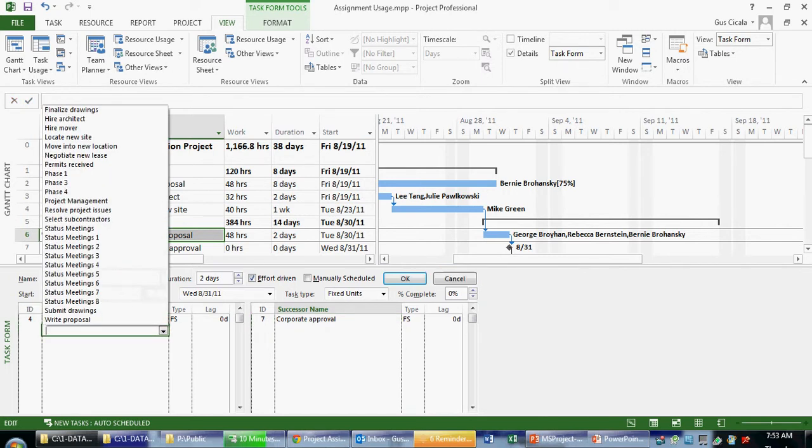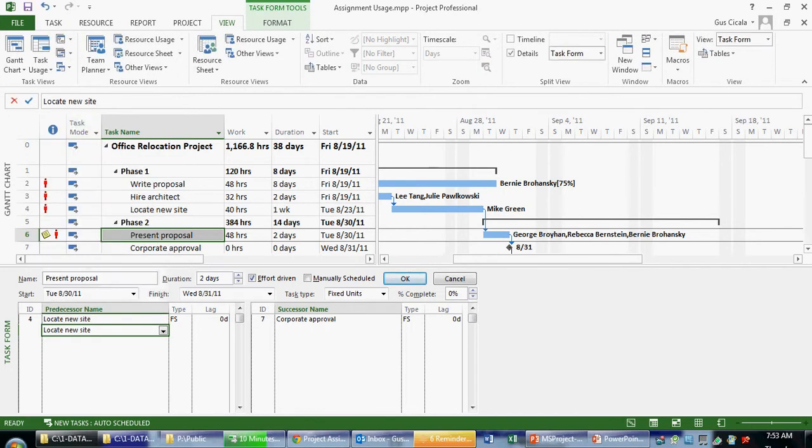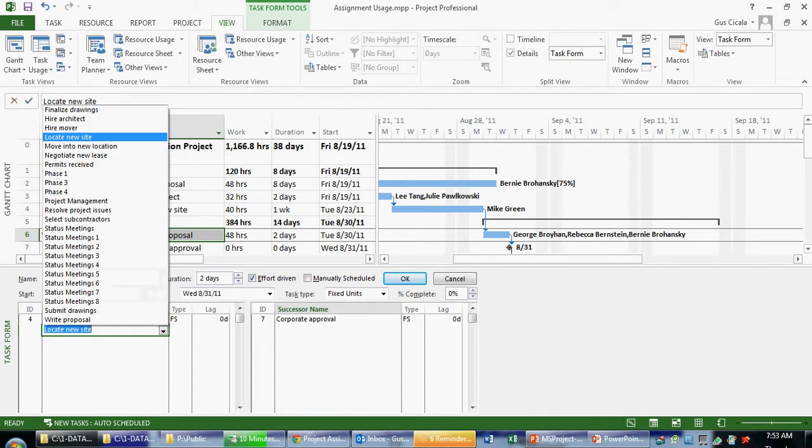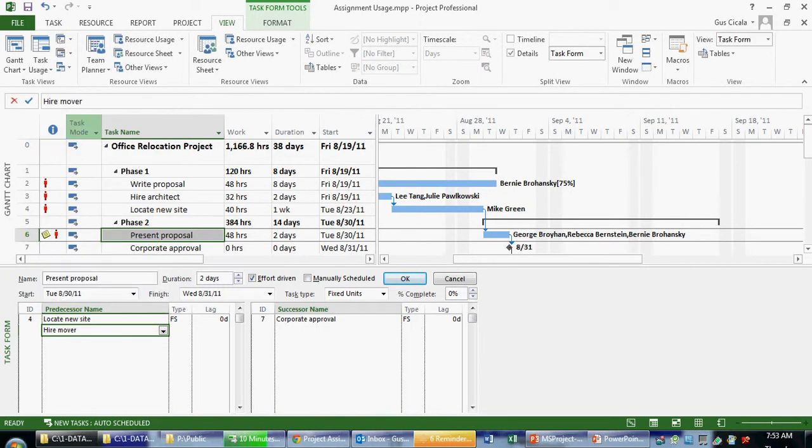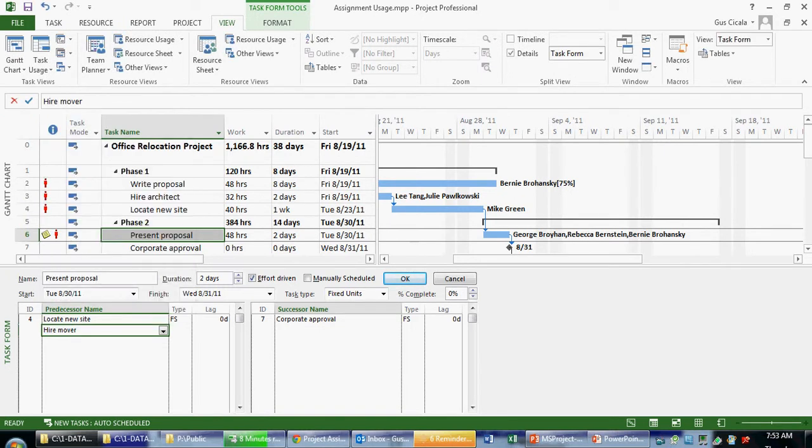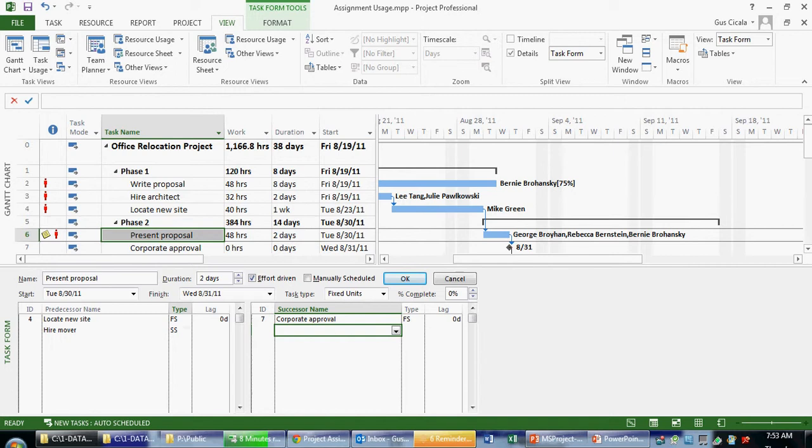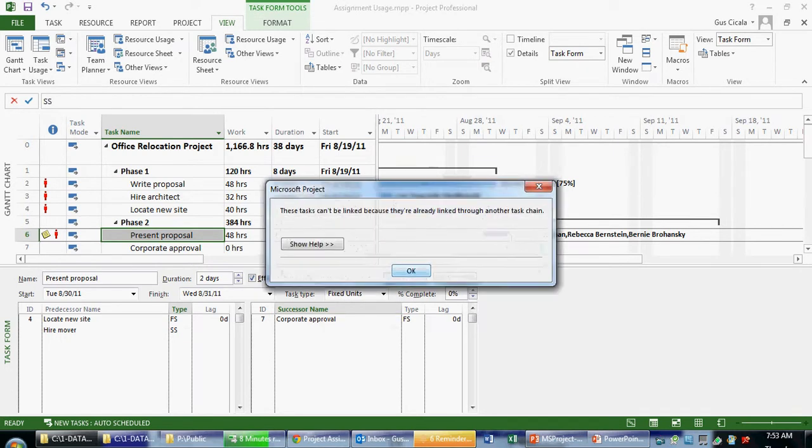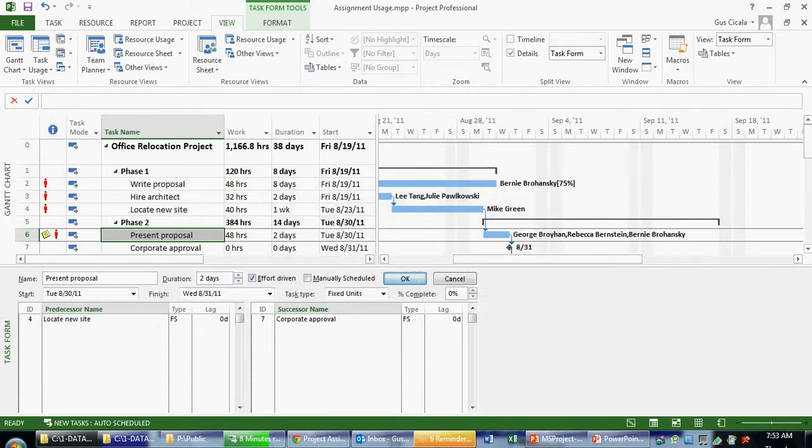I can use this view to actually add information. So if I wanted to add a new predecessor, I could. In this case, it's the same one, which is not a good idea. So if I need to hire a mover and locate a new site, I can manipulate the types. Finish to finish, finish to start, start to finish, start to start. Same thing with the successors. When I click OK, that information gets applied. In this case, that's not a valid link. So I'm going to get rid of that.